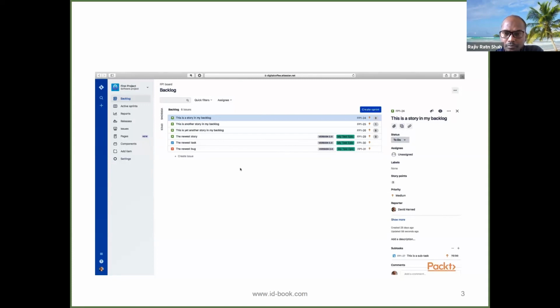Okay, so now that we have this backlog with some items in it, we want to do a couple of things here. First of all, you've got what's called a definition of ready, all right? And any of your items that have been fully refined, which means that all of the questions have been answered, all of the understanding of what this thing is have been defined, and they meet what's called a definition of ready for your team. Your definition of ready could mean it's got acceptance criteria in it, so we understand when will the product owner think this item is done, and other criteria will be met in order for it to be ready. We want to have, ideally, at least 2 sprints of ready work that's ready to go at any time. So let's do that first.